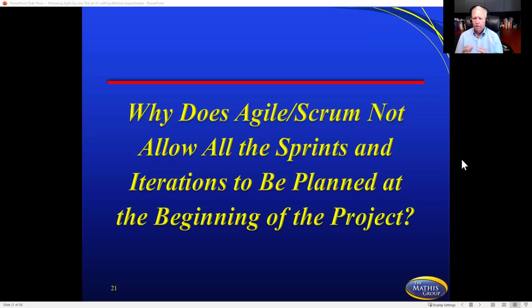That's for control. You're not wanting control on the Agile side. You want flexibility. That's a reason why you're not wanting to pay for a change order. You're not wanting to have to go through a change control board and fill out a form and do a calculation on how much this change is going to hurt the project plan. The goal is flexibility, not control. Traditional, it's going to be control.